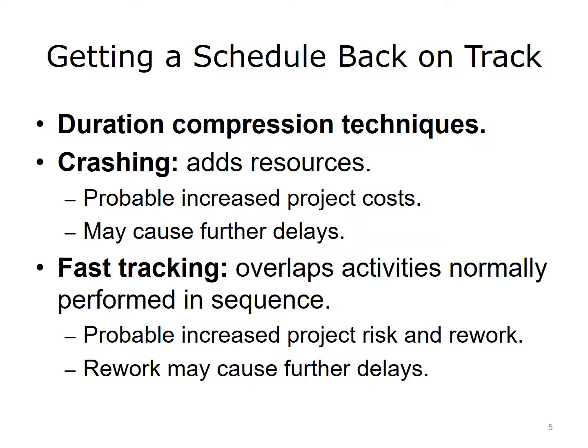A second compression technique is called fast-tracking. Fast-tracking overlaps activities that are normally performed in sequence. Typically, the schedule requires activities to complete in sequence because the following activity depends on the one before, so the parallel activities may cause confusion and require occasional rework.